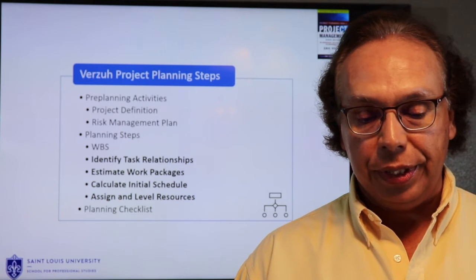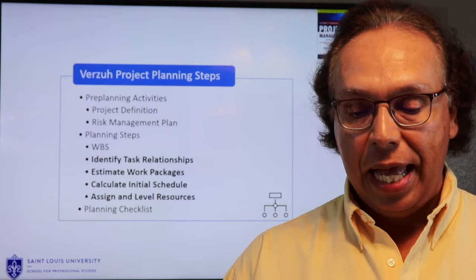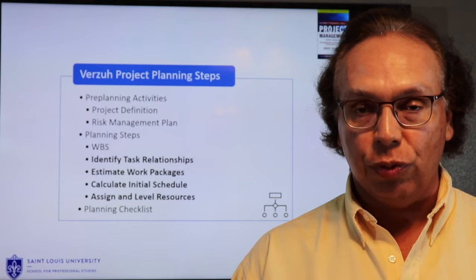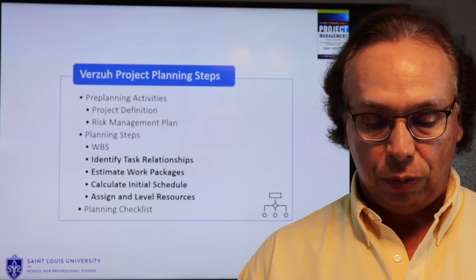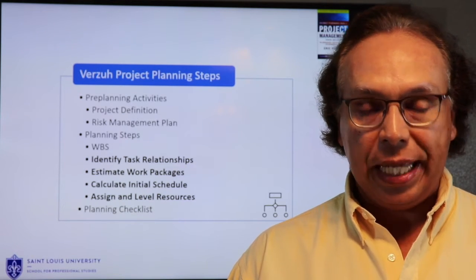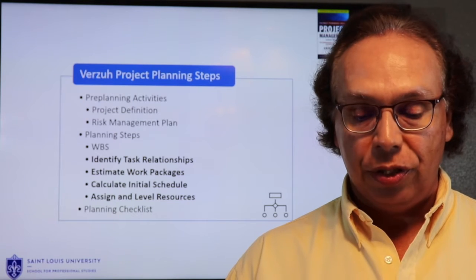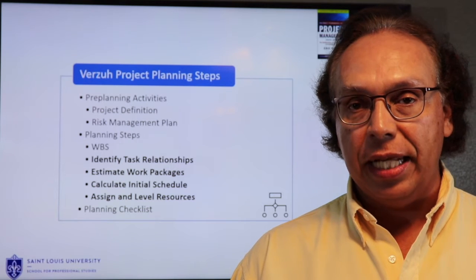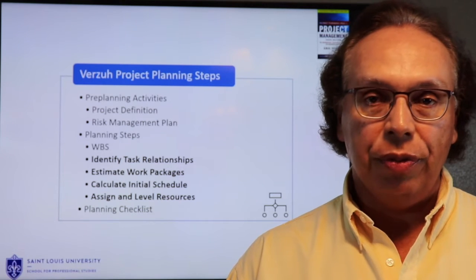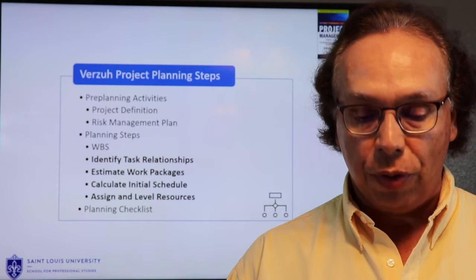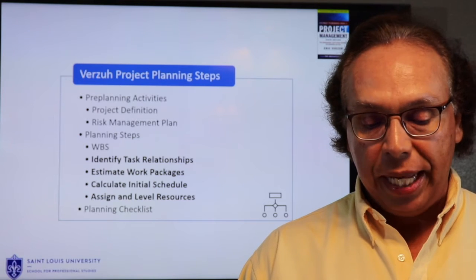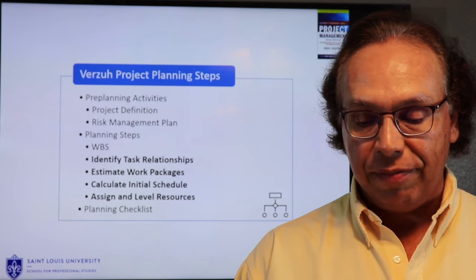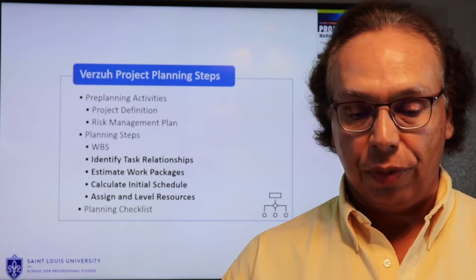Step number two is the identification of tasks, activities, and relationships. Step three is estimating the work packages, which we'll do a deeper dive into next week. Step four is calculating or building the initial schedule using the tool of your choice. Step five is assigning and leveling resources so that nobody works over 40 hours. Please see the planning checklist available in the files section of Canvas in Templates and Forms.